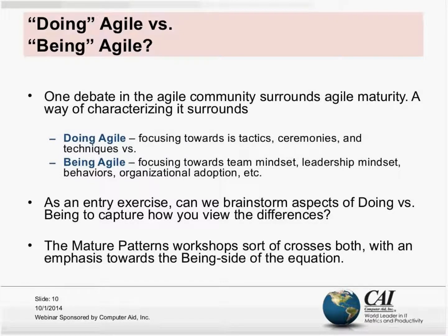Now, I think a mature team, in a being Agile context, would have powerful stand-ups. So what would that look like? That would look like the team is talking not to the Scrum Master but to themselves. The team is focused on the sprint goal rather than a status report. The team gets to the stand-up on time. The team self-facilitates and makes sure that people aren't getting too windy, and they end in 15 minutes.